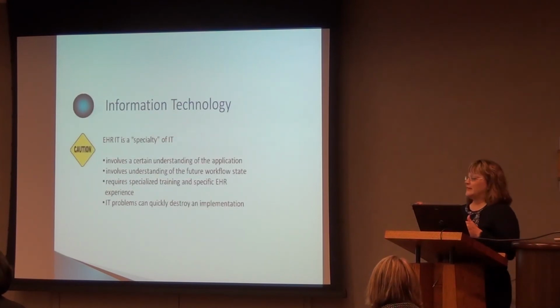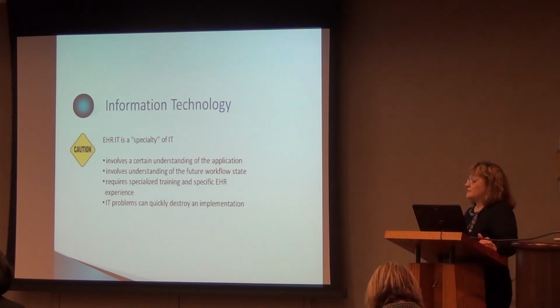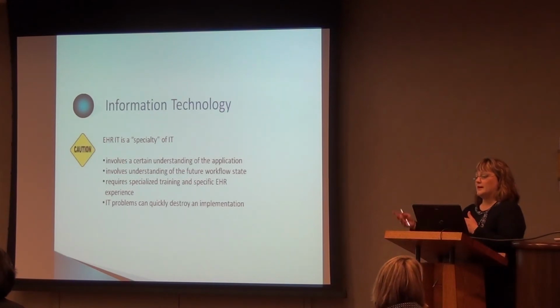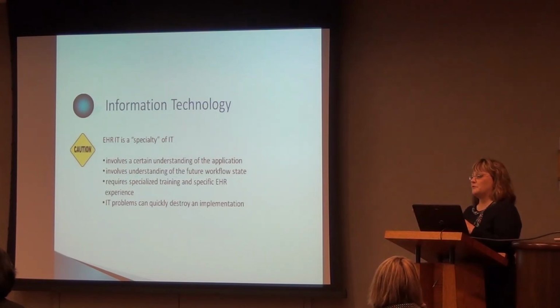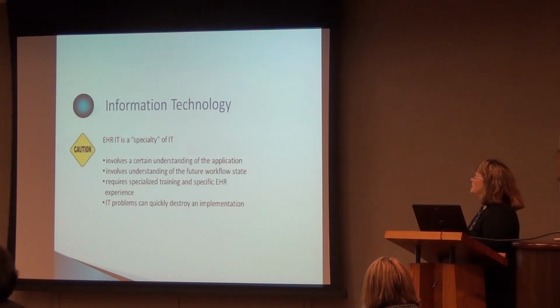Here is the caution I will give you from doing this for 10 years. EHR is a specialty of IT. In the medical world, it's like a specialist. So you can have a great IT person who is very knowledgeable, but if they have not experienced EHR, you're going to have trouble. It's just something you learn over time, tweaking routers and understanding that this particular type of computer doesn't work well, like the IBM ThinkPad, this model. You don't want to experience the testing of that while you're going live with an EHR. That can kill an implementation.